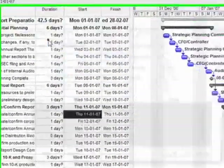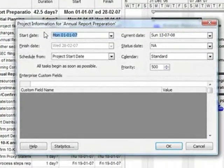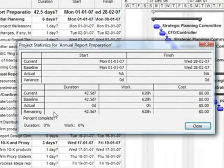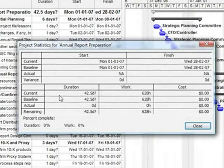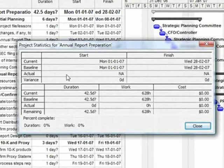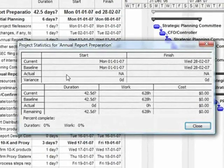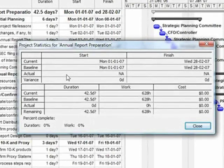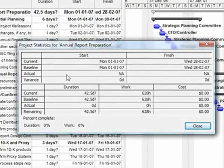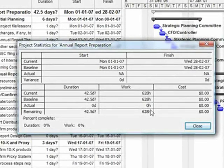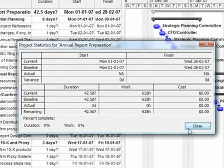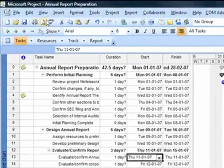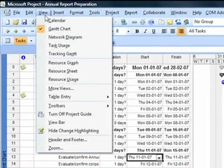Currently the baseline and the current values across start date, finish date, duration, work, and cost are absolutely same. This is because we have not updated progress information or any kind of delays in our project. So project statistics is one place where you view the impact of baseline.